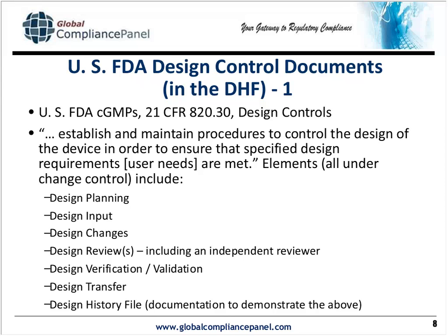The FDA does not specify a frequency of reviews, although even though they talk about basically one in the GMPs, you'll notice on a slide that they publish, they show several of them. And the design review has to include an independent reviewer, somebody who's capable to do a legitimate review on that phase that's under review, but does not have a vested interest in the outcome of the review. So maybe you have a program being developed. You could bring in a programmer that might be involved in another element in the same project, but not this particular phase that is under review, as part of your reviewer.